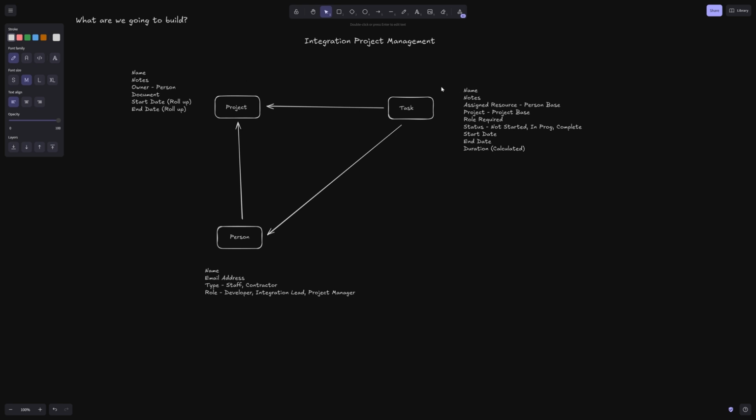So you can kind of look up on another table and do some calculations based on that. So our start date for the project would potentially be the minimum start date for the task that's associated to that project. And the end date would be then the maximum end date. So that would give you an idea of when the project needs to start and when it will obviously be completed by. So we're going to say those are going to be calculated fields.